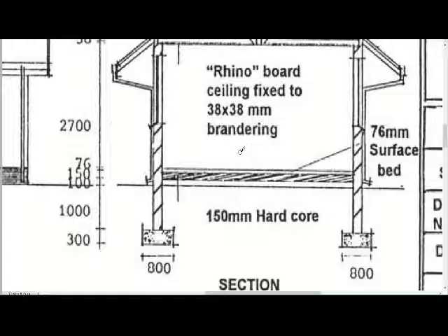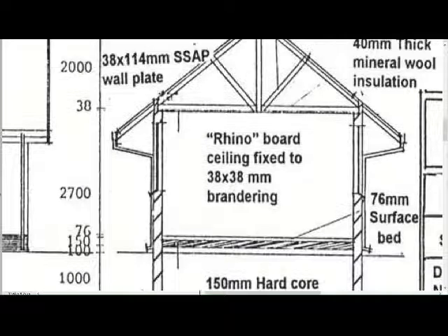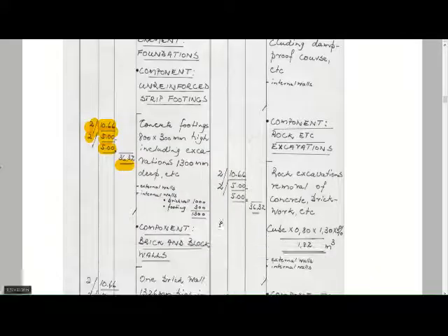That wall should have an excavation as well. Some of your designs might not necessarily allow for the internal walls to have a foundation. Sometimes the easiest way these days is they just design a thicker surface bed so that you can actually construct a 110 wall on top of that surface bed, so you don't have to worry about foundations for that internal wall. Okay, so that's more or less how the measurement works.